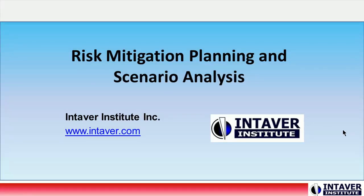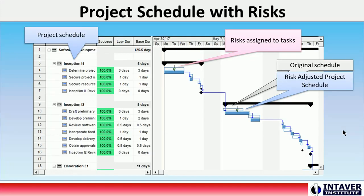Welcome to our video on Risk Mitigation Planning and Scenario Analysis. We are going to take a quick look at Risk Mitigation Planning as part of Project Risk Analysis. Here is a project schedule with risks assigned to tasks and resources. Monte Carlo simulation is used to determine a risk-adjusted project schedule and rank project risks.